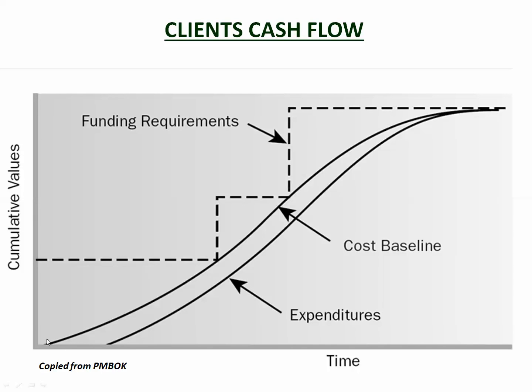So what he'll do is at the beginning he'll say, okay, I'll borrow this much money and that'll get me through to this time here, and then when I get here I will borrow some more and that'll get me through to there, and then when I get to here I'm going to borrow this much more. So what he's got there is a plan. This is how I'm going to finance the project, and it gives him a pretty good idea of what his interest costs are going to be, and he can plan that to try to minimize those interest costs and therefore maximize his profit.